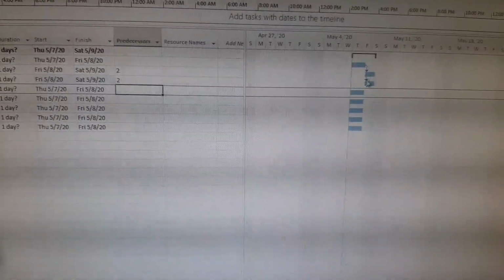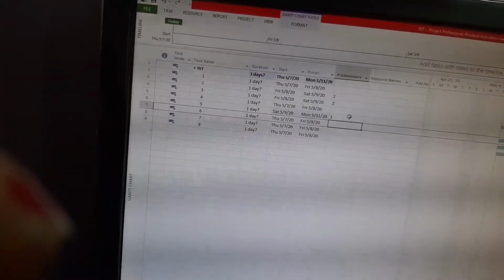This we call as the linking of the tasks. Coming to activity 5, activity 2 is a predecessor. Where is activity 5? Activity 5 is here. So activity 2 stands in which row? Third row. It means for activity 5, this is 3FS. Got it? So the links are taking place the same way.